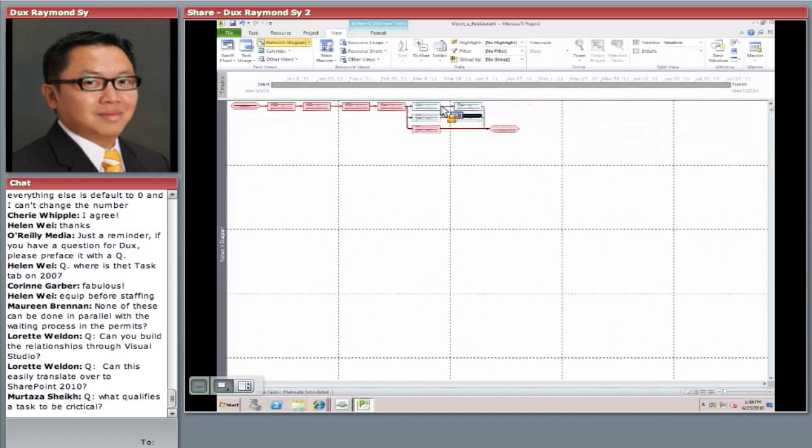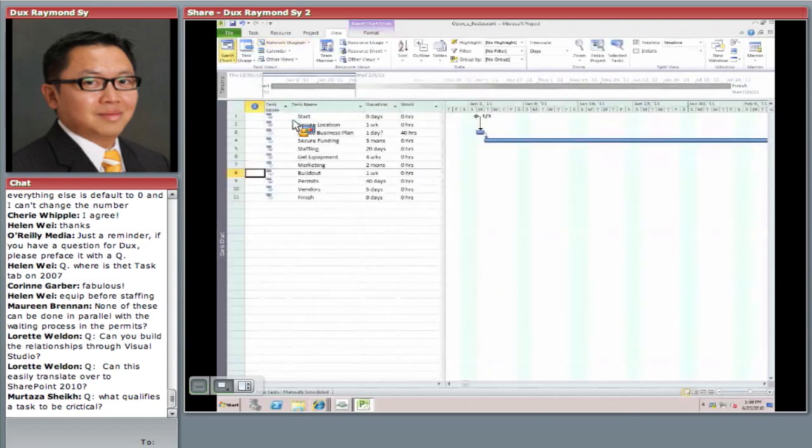Whereas these blue ones are tasks that are not part of the critical path, and they have what's called extra time or slack. So we'll find out what those are. But if you get behind maybe a day or two on these blue boxes, you're still fine. The whole project would still be on schedule. Okay? I have a whole discussion around critical path in one of my webcasts. It's on the slide. So if I go back to the Gantt chart,